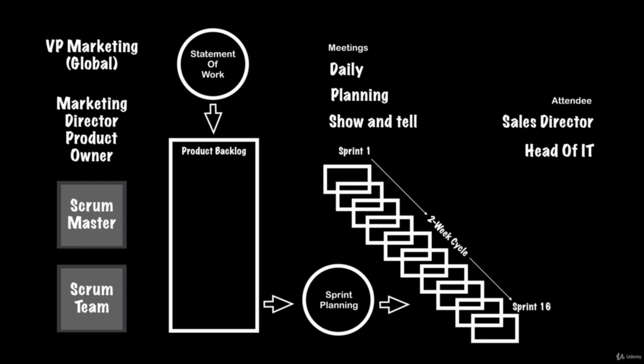And one thing I also like to highlight is we didn't use user stories. We used the word task instead. So the product backlog had tasks, big level epic tasks. For example, create a mock-up of the homepage. That would be a deliverable at the end of the sprint. But leading to that, there will be subtasks, smaller tasks that you need to use to create that final goal.